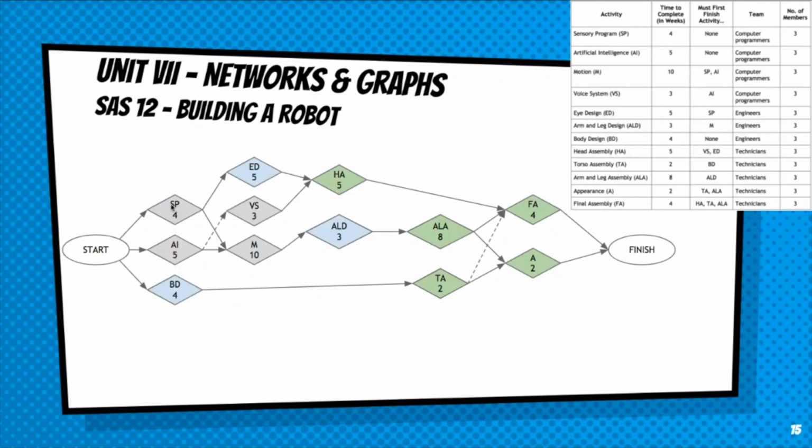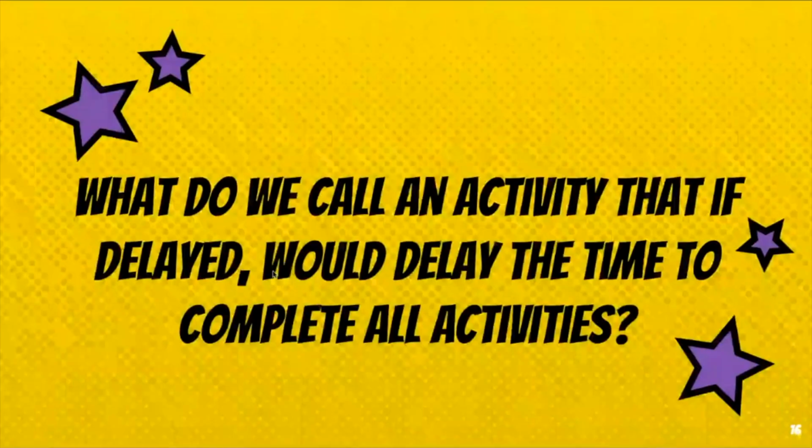We already know that we could probably take these three guys and put them somewhere. Well, considering the fact that iDesign is available, we could throw all three of them in there for a week and help out until these two tasks become available to be worked on. Does that make sense? And that would help a lot, especially even if it only helped a half a week, it would still reduce that by a week and a half. You see what I'm doing? And that's exactly why we would consider it.